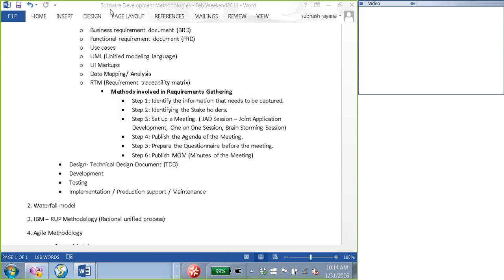Okay. The project manager is the one who actually identifies the budget, prepares the high-level and low-level budget estimates, reviews it with the business, makes sure that the business is approving the budget, and until there is an agreement on what the budget is and what the approval is, the project will not kick off the next level.